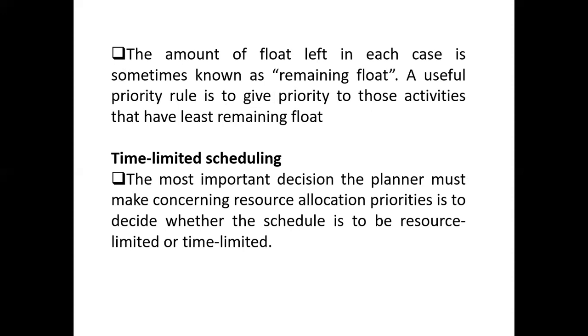Another rule is time-limited scheduling. The most important decision the planner must take concerning resource allocation priorities is to decide whether the schedule is to be resource limited or time limited. In the meantime, we're talking about time limited. Those are the activities where time is very, very important.